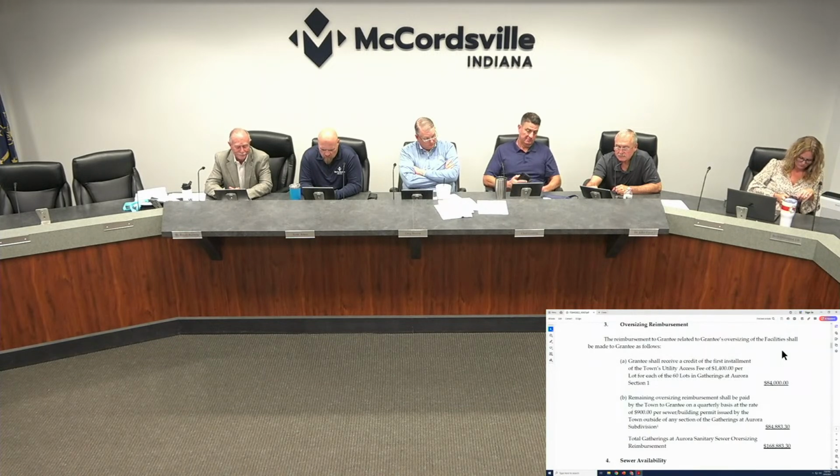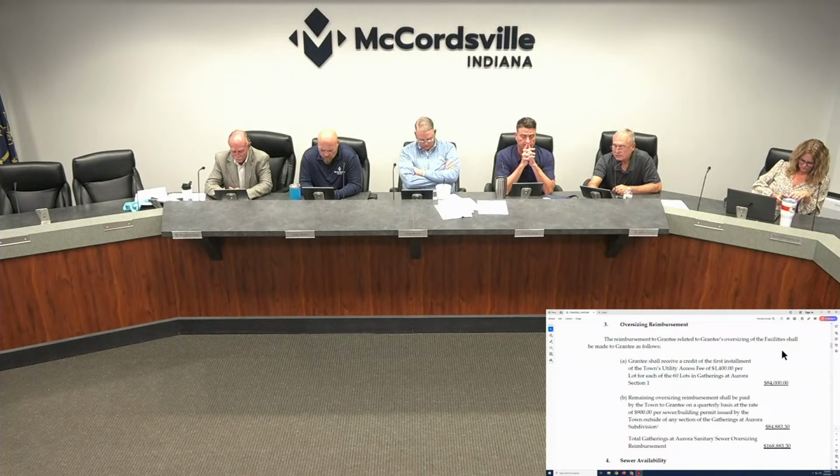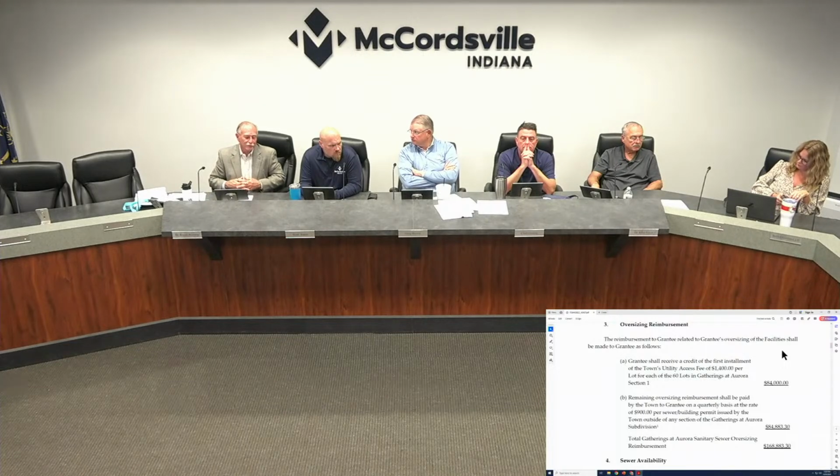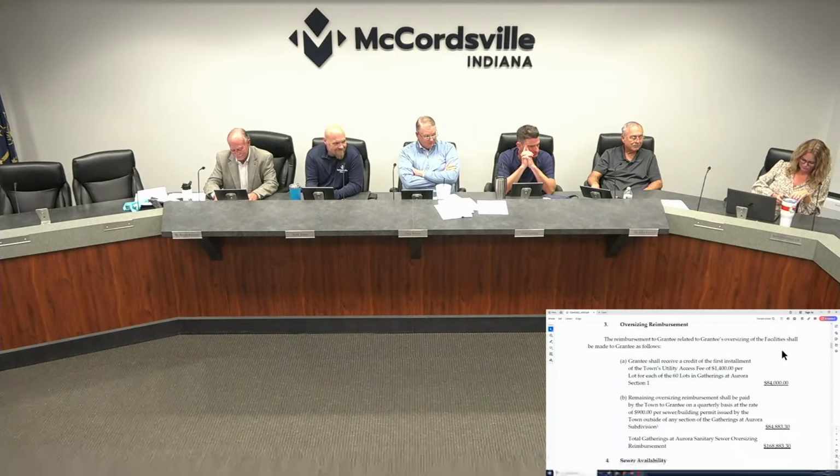So if we have 300 building permits per year, and say 250 of them were from outside of gatherings, then 250 times the 900 would be reimbursed quarterly back to gatherings until they paid off that sum of $84,883. Okay. I was just chuckling at the thought of the town of McCordsville being one big sewer basin. Yeah. We do not start reimbursing them, though, until we pay off the previous